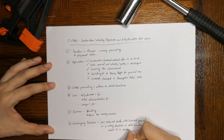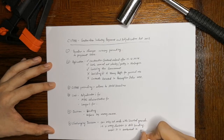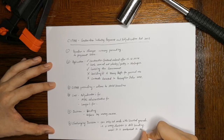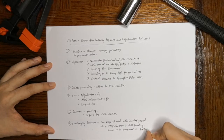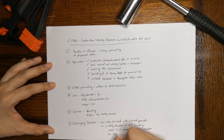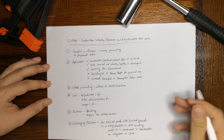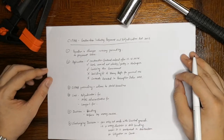Because the decision is meant to be an interim decision for a temporary measure, the issues determined can be arbitrated or litigated again in court at the conclusion or termination of the construction contract. Basically, the employer will just have to pay first and argue later.